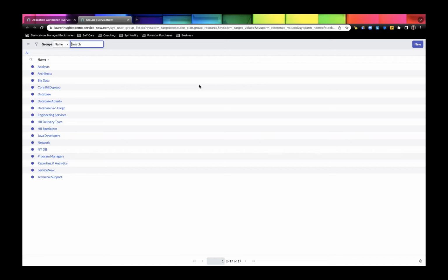User rate defined at user level is different. If the user rate defined at the user level is different from the group level, what will be considered for the cost calculation? If the hours are going under the group rate, it's going to be the group rate. If it's going at the specific user level, it's going to be that user rate. I hope that answers it. If you have anything else, let me know.